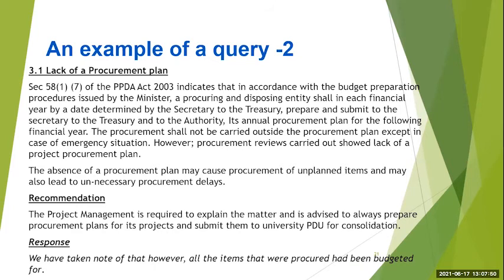It was really correct. It was the right way to do things. So their recommendation was that the project management is required to explain the matter and is advised always to prepare procurement plans for its projects and submit them to the university procurement and disposal unit for consolidation.